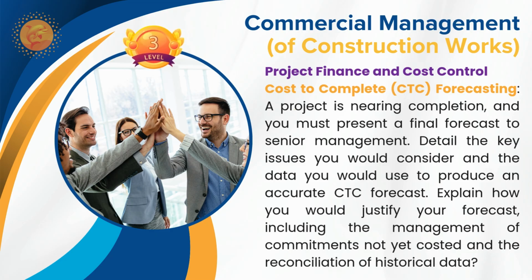And reconciliation of historical data means that, as per the cutoff date, how much cost is incurred and how much value of valuation of the work is there. I will check accordingly, and if any correction is there, if that is positive, it is well and good. If it is negative, then I will identify certain areas for corrective actions in future work, in my future cost to complete report.